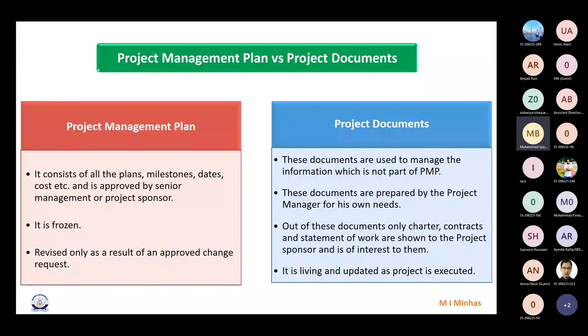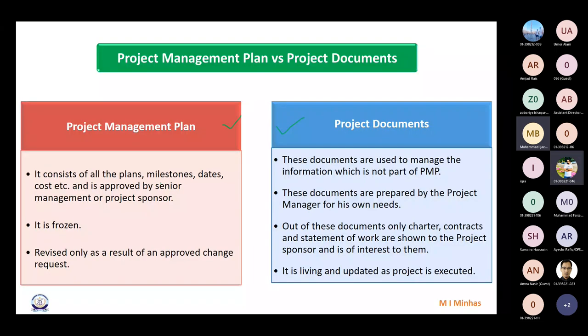Now, what's the difference between project management plan and project documents? Can someone tell me? Project documents, the documents that are produced on the project. Actually, all the plans and the baselines are called plans, right? The 12 plans that I've told you are part of the project management plan, and the baselines also become part of the project management plan. Whatever is created on the project other than these plans is called a project document.